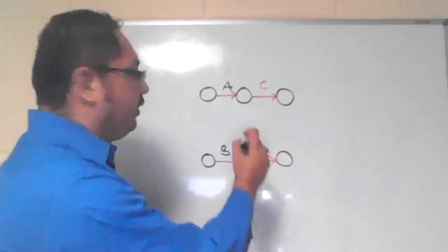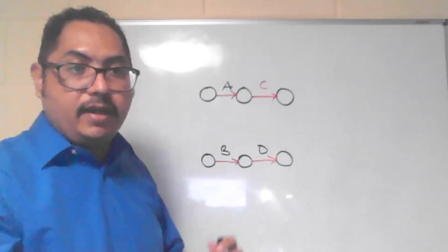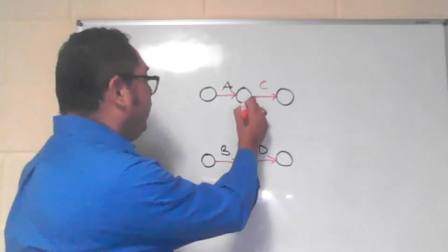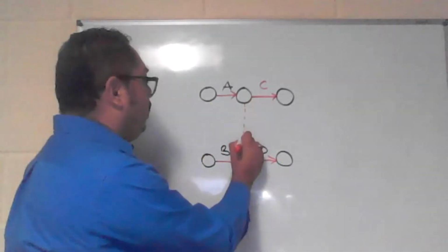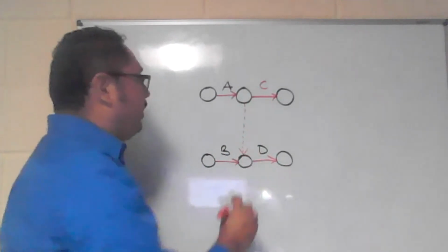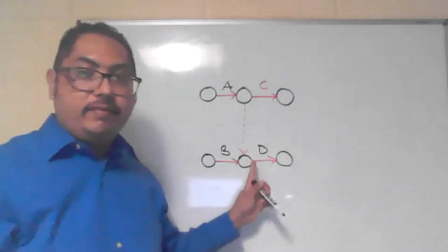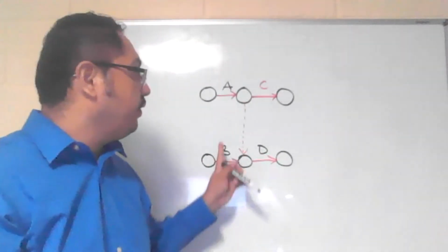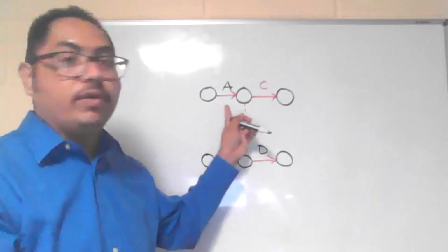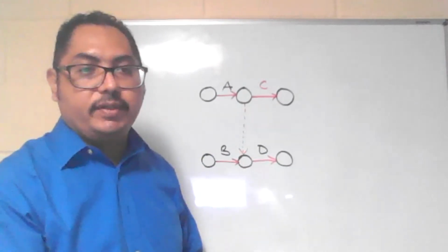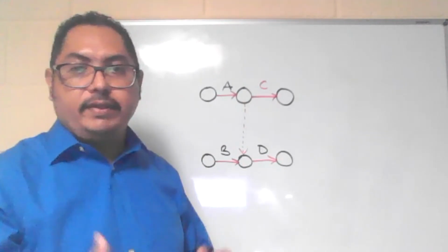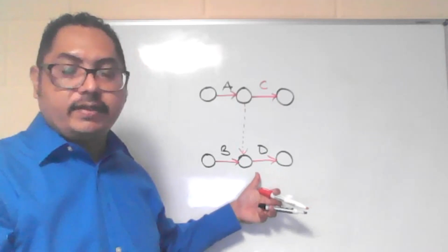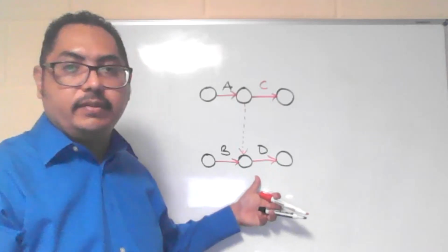The dummy connector is a dotted arrow going down from the end of activity A, marking that activity D cannot start before activity B is complete or activity A is complete. Activity D then can start only if activity A and B are complete.